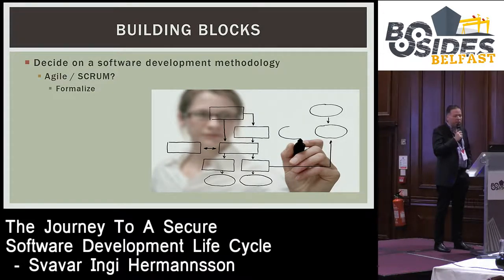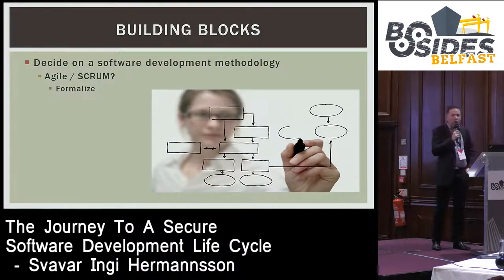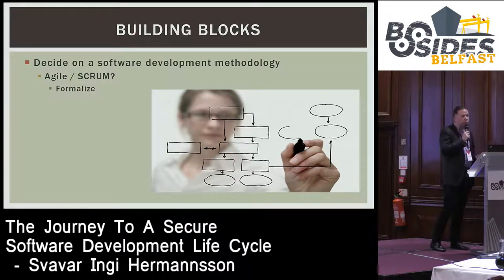And this could be some basic things. This could be, what should be the composition of your Scrum team? Like the number of people? Do you always want to have one database person? Always want to have one person that knows system X, system Y? How long should your sprints be? Should it be 2 weeks, 4 weeks, 6 weeks? Should the Scrum team be allowed to select these periods? Who is allowed to create a user story? Who is allowed to create a task? Who is allowed to add a task to an already running sprint? So once you've decided on all of this, then you might want to digitize it.